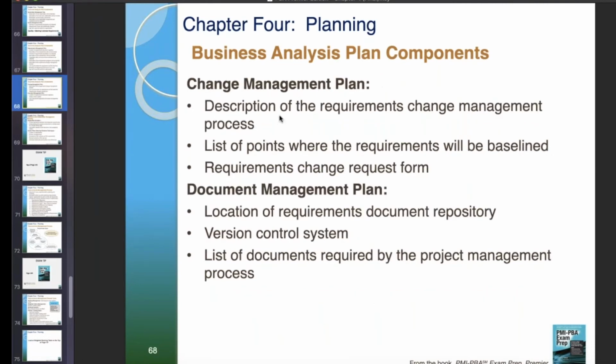For a change policy: description of the requirements change management process, list of points where the requirements will be baselined, and a requirements change request form for people to use, regardless of what group or department that stakeholder falls in. One form for all.